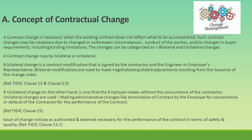Additionally, the issuance of change notices is authorized and deemed necessary for the performance of the contract in terms of safety and quality. FIDIC Clause 13.1 — Right to Vary — gives the engineer the authority to issue instructions for variations at any time before the completion of the works, ensuring that necessary adjustments can be made to enhance the project's success. By following the guidelines set out in these FIDIC clauses, both parties can ensure that changes are managed effectively and fairly.